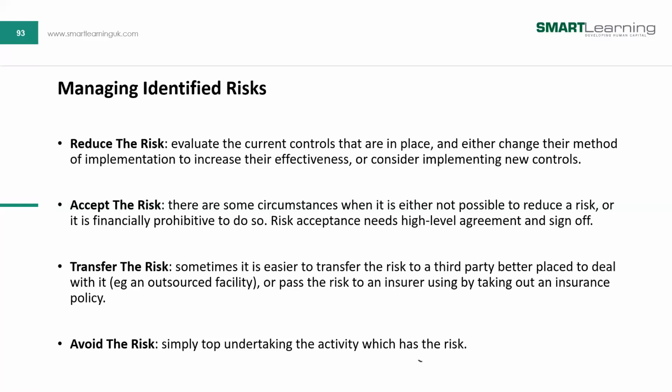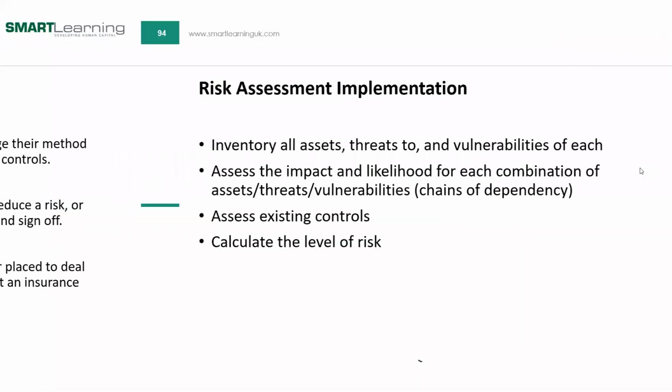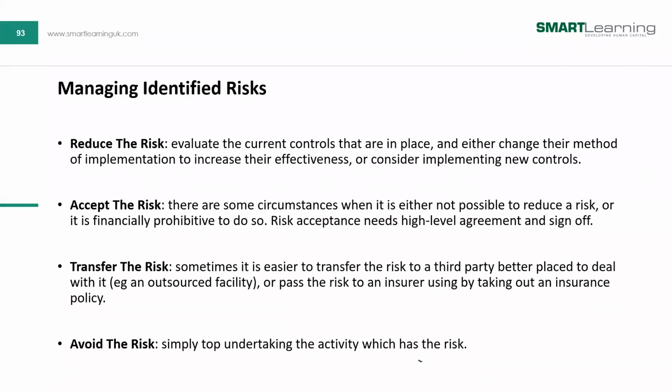You can transfer the risk, like I said. As you can see, you can engage an outsourced facility, or outsource it, or take out insurance. So you can pass the risk to an insurer. That is risk transference, or simply stop the activity by avoiding the risk.